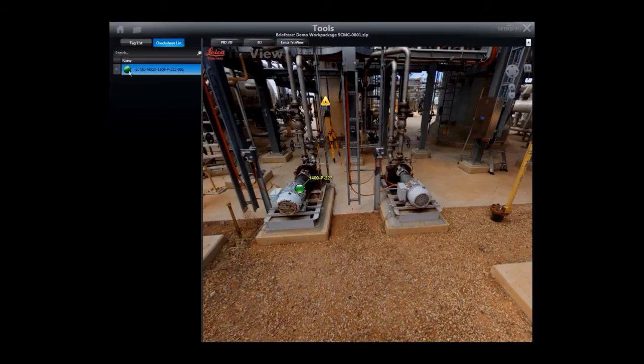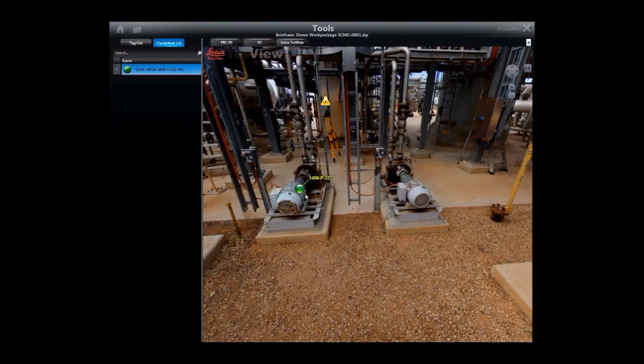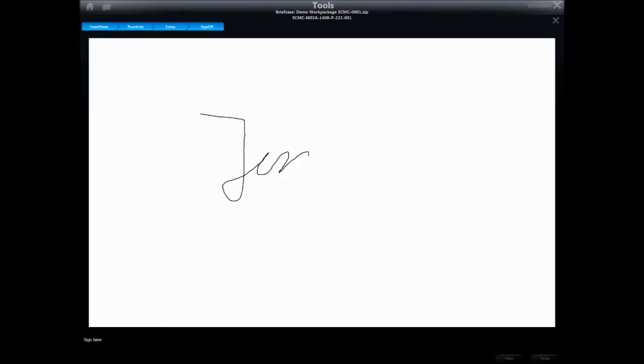The traffic light for the pump tag is set to green to indicate that all checklists for this tag are also complete. The work package can be then signed off in the field and uploaded to the SPO server when network connectivity is available.